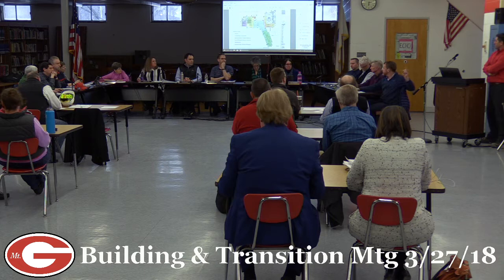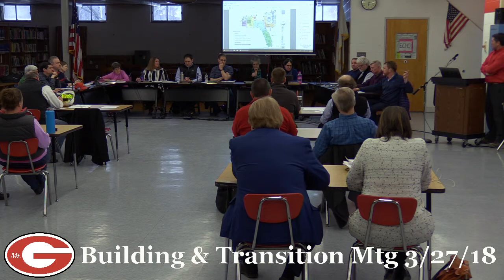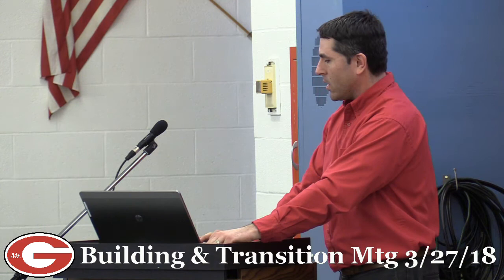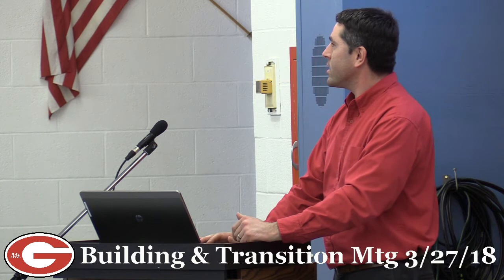Just to be clear with the audience, substantially complete is the date construction stops. It doesn't necessarily mean humans can occupy the space. Right. It's upon the issuance of the TCO, temporary certificate of occupancy, that people and combustibles can move in. We had some preliminary discussions with the building department about moving combustibles into the building, so boxes of books or supplies, whatever they intend to put in the classrooms. That's contingent on having life safety systems set up. Life safety is sprinkler systems and fire alarm.